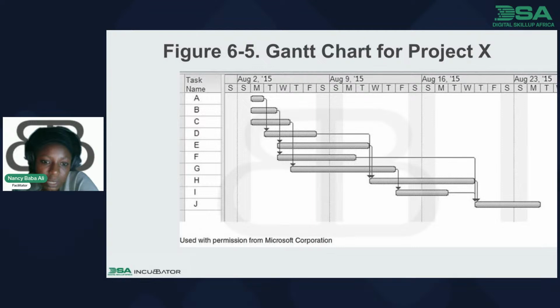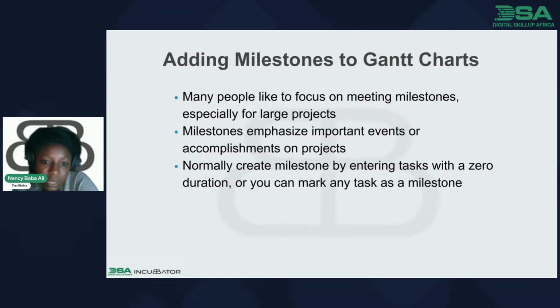the important events or accomplishments on a project, and you normally create milestones by entering tasks with a duration, or you can mark any task as a milestone.